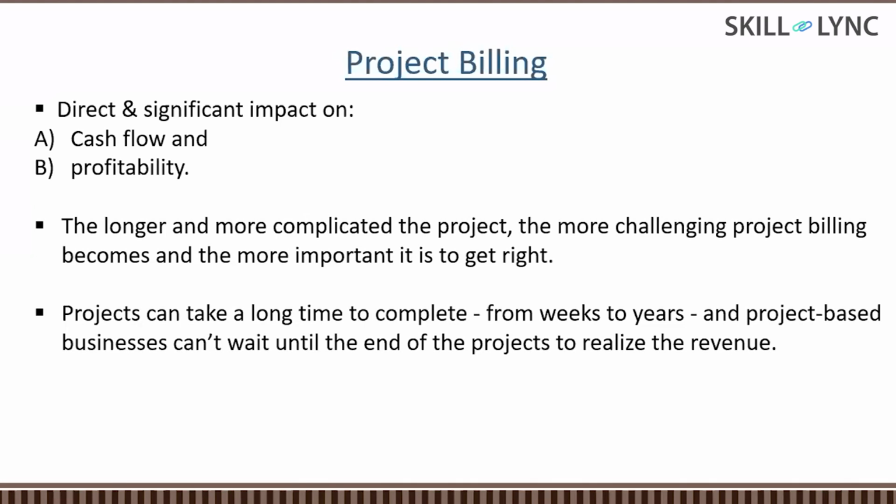Second thing, profitability. If they get the money only at the end of the project, then to complete the project they require this money, so they will be borrowing it from some bank and then have to pay interest on that amount. If they give that interest to the bank, then what will they earn? So profitability is very much dependent on this too. Next, projects are very complex. A few projects are simple, but if a project is complex, it takes more time, and billing becomes more challenging, because a lot of bills have to be submitted every time and a lot of things have to happen.